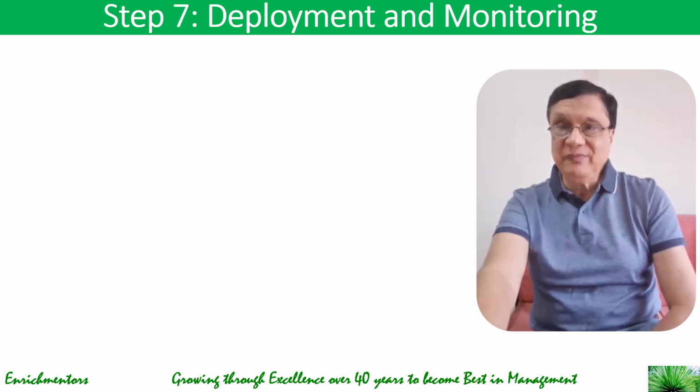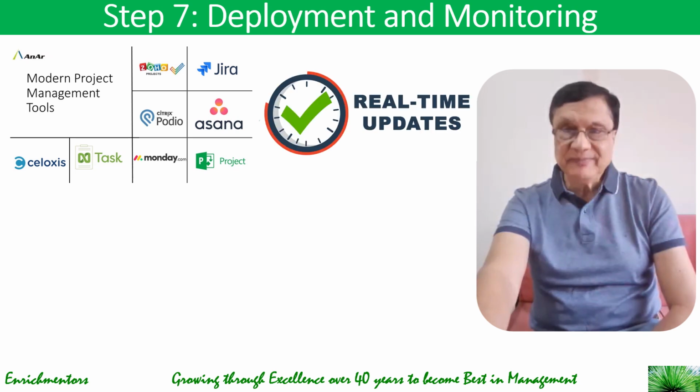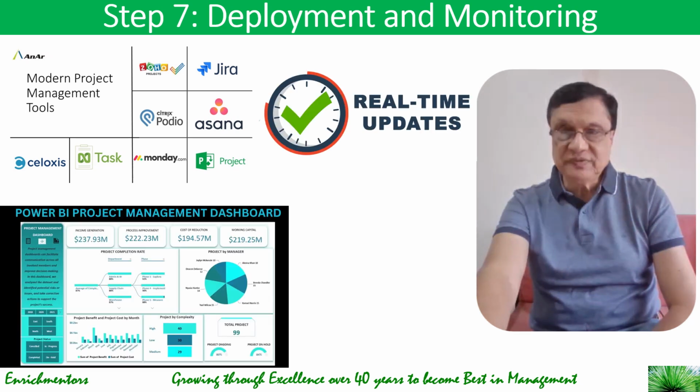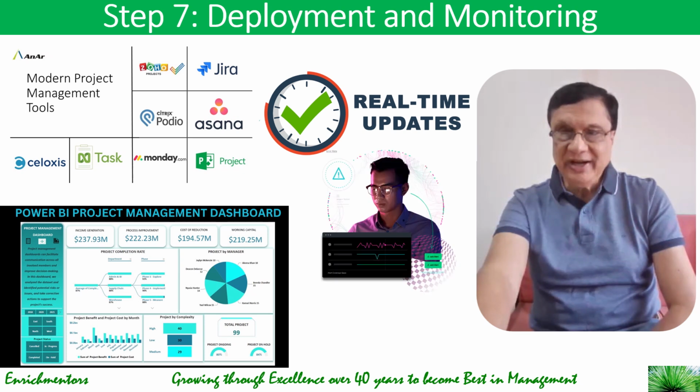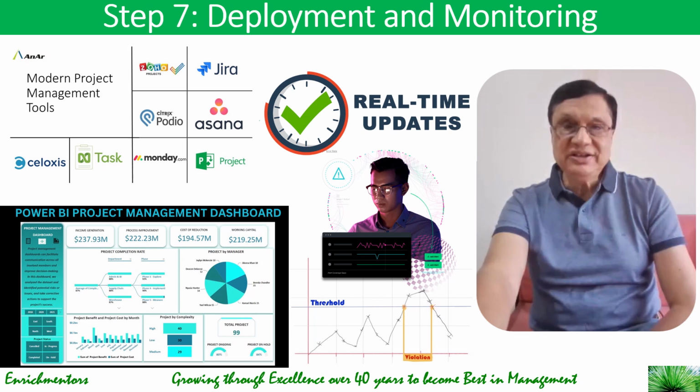You integrate them with the current PM tools like Jira and MS Project to get real-time updates, right? And you generate dashboards with tools like Power BI, Tableau, and Grafana, and alert managers when a task hits a certain delay probability threshold. So like this, you deploy and monitor.